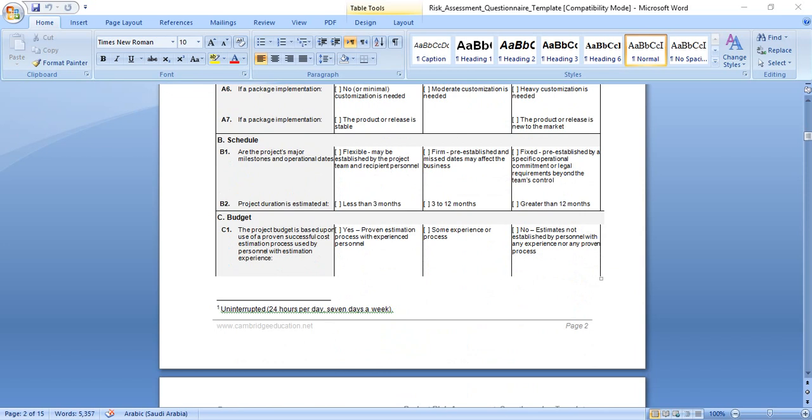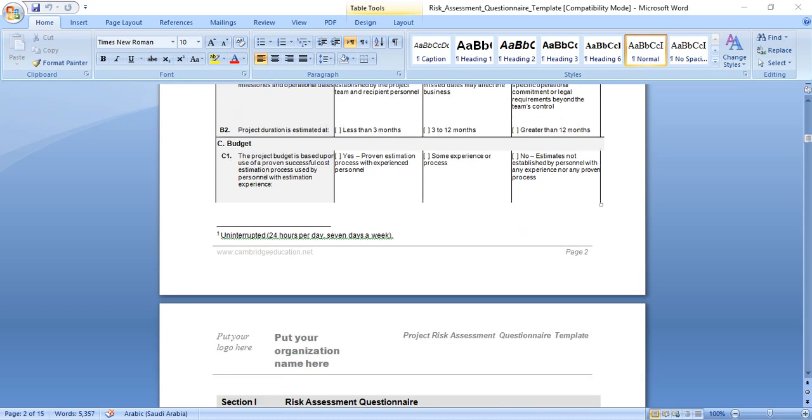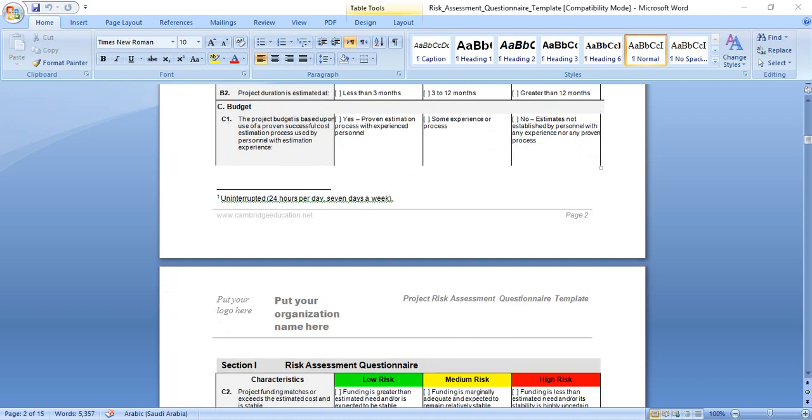Regarding schedule, are the project major milestones and operational dates flexible? They may be established by the project team and recipient personnel, this means low risk. Firm but established, and dates may affect the business, this means medium risk. Fixed dates, if the schedule is fixed and we have to meet these dates, this means higher risk. If we don't meet the specific operational commitments or legal requirements beyond the team's control. Project duration estimated as less than three months means less risk. Three to twelve months means medium risk. More than twelve months will be higher risk.